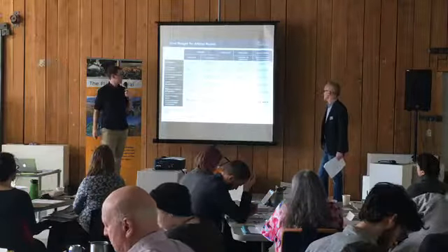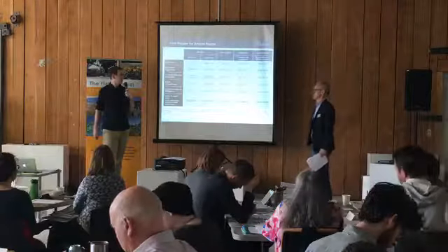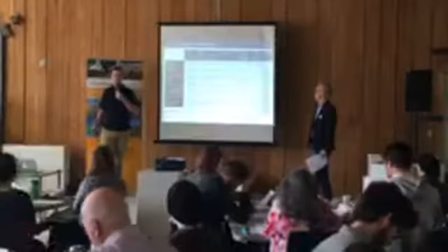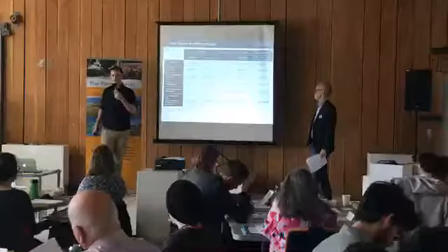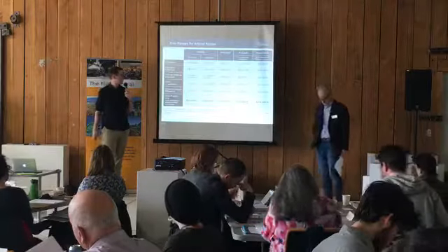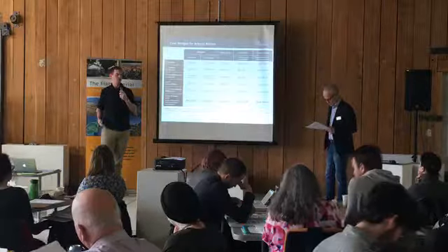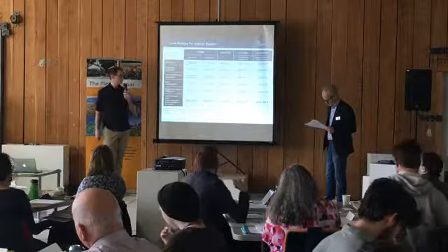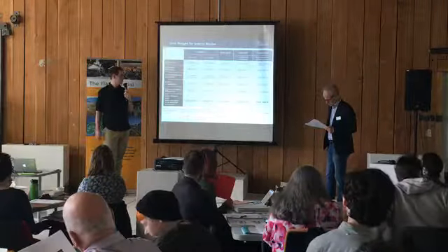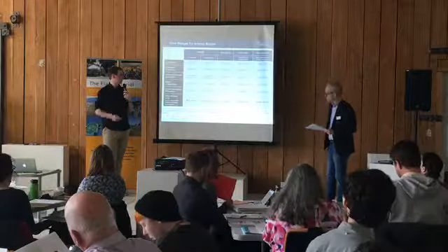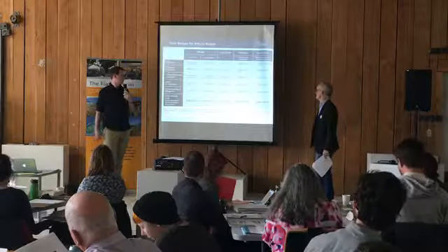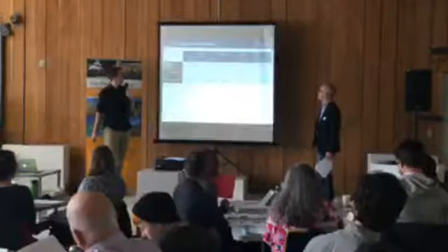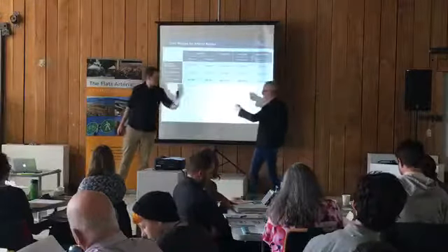On the land acquisition and property impact mitigation side, the Melton, William, and National ones, again, because we have a greater extent of property impacts, there's higher cost estimates there, including along National, the costs for relocating some of the works yard and fire training facilities are fairly significant and one of the key considerations there. And summing all those up is how we get our total anticipated cost ranges for each of the options. And then, Doug, did you want to touch a little bit on the park costs?